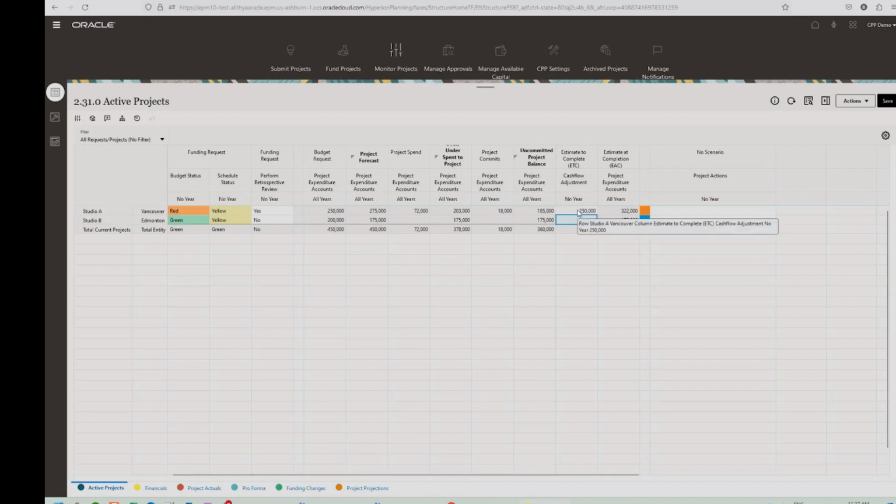These should be concepts that are in their project execution tools, or they should be calculating it. Then we calculate the EAC: if you're saying it's $250,000 to finish the project, that means you're going to be at the end of the project at $322,000. That's a lot more than what we funded it for at $275,000.